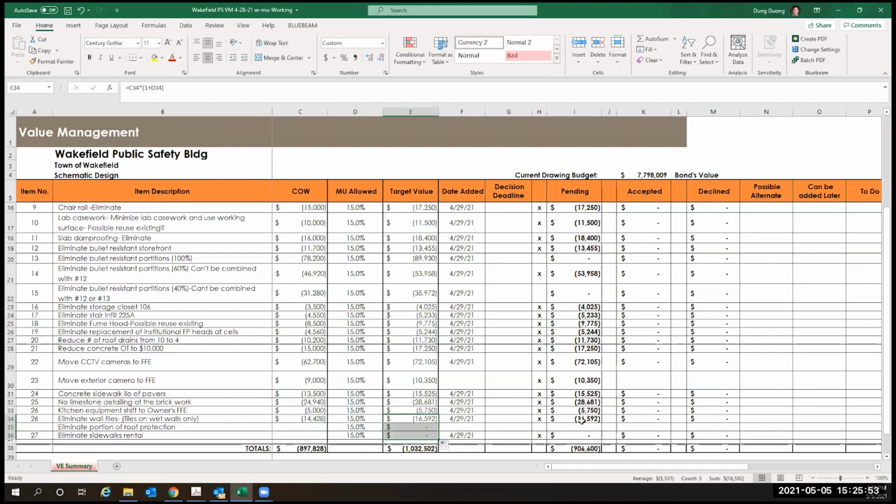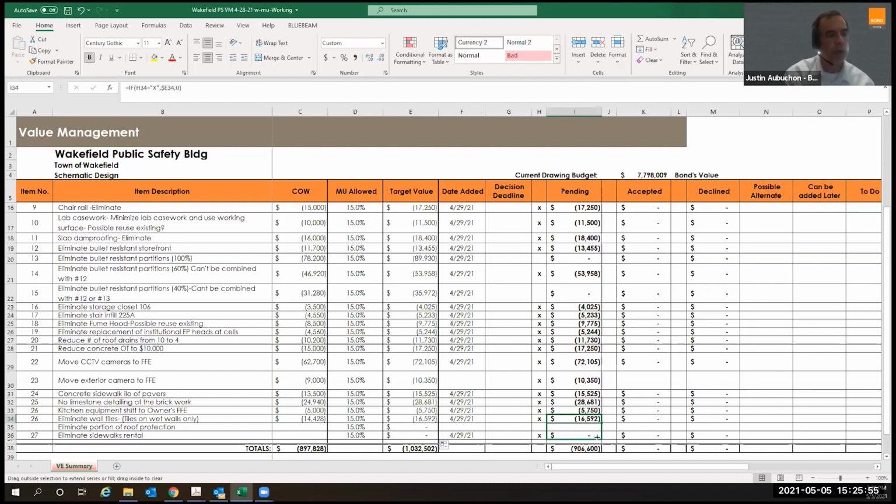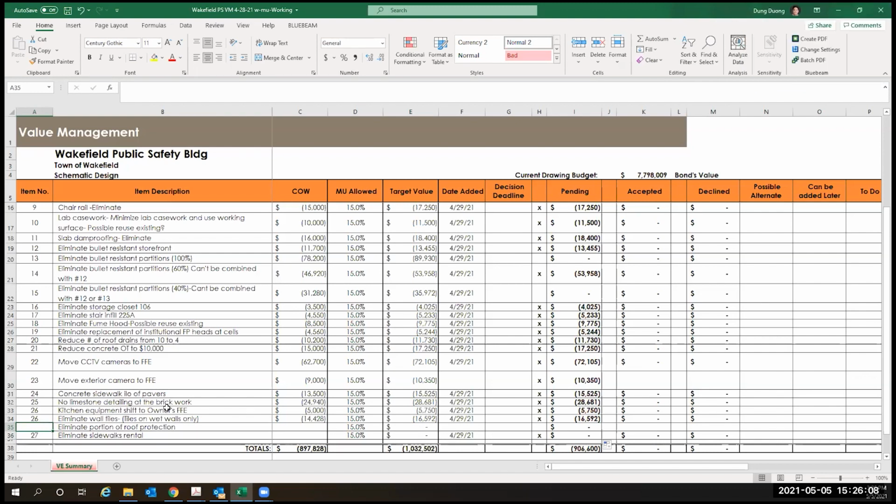Right. And the thought in front of the process of building would be that there'll be multiple trades up there on the roof, not just the roofer. Right. Okay, so I think the front of the building is about 75 feet, and then the side is about 15, plus the rooftop flat existing area, which is another 20 feet, 30 feet, so we can reduce that. Yep.